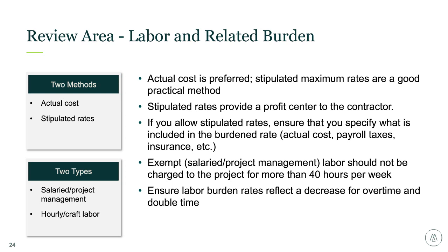And so, for example, if the project management's 40 hours and their time cards show 15 hours Monday through Wednesday on Thanksgiving week, they get the credit for that, but you're paying for them to go on the holiday. So if they're salaried, limited to 40 hours, can help you save money.